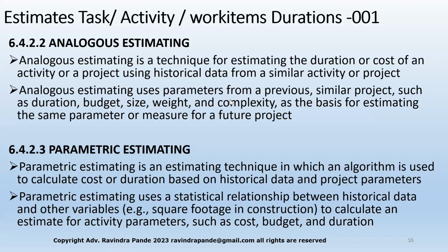So we might have improved our efficiency by, let's say, 30%. So for this building, we might plan with the efficiency of 30% to construct that building. Similarly, we might use these kinds of mathematical formulas to use historical figures with the efficiency we have in getting the job done and build our next level planning.